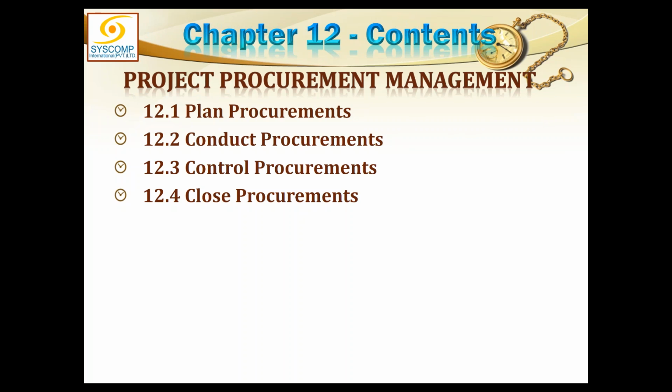Maybe it is no more valid at that point in time. And moreover, we want to give the contract when we require it to be done. So the process of giving the contract starts a little before the actual work which has to be outsourced is supposed to start.